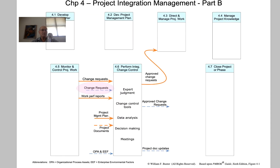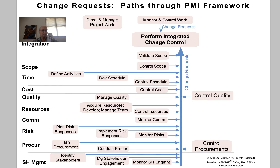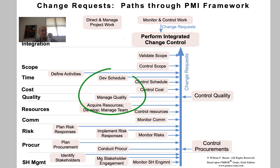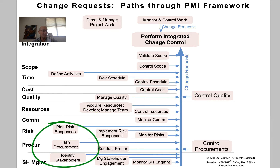We see change requests also coming from many other processes in other knowledge areas, which looks like this — a whole bunch of processes, mostly control, but a lot of execution and even some planning processes. And they all need to go through Perform Integrated Change Control to be reviewed and approved or rejected.